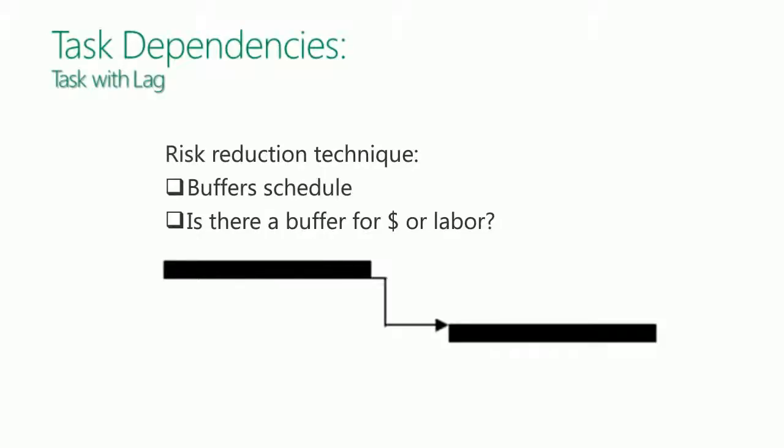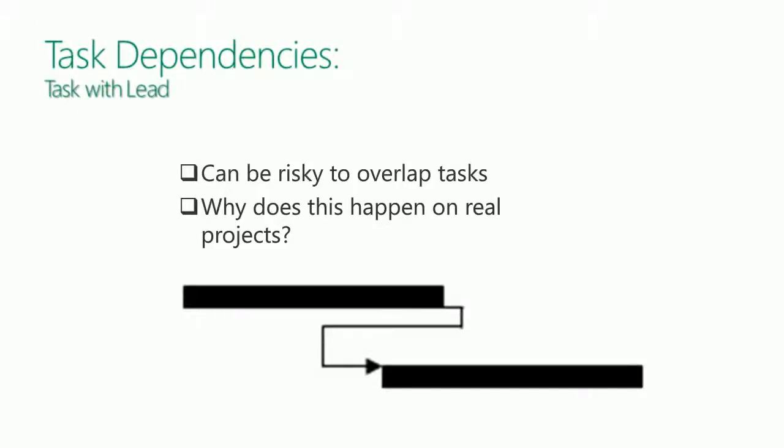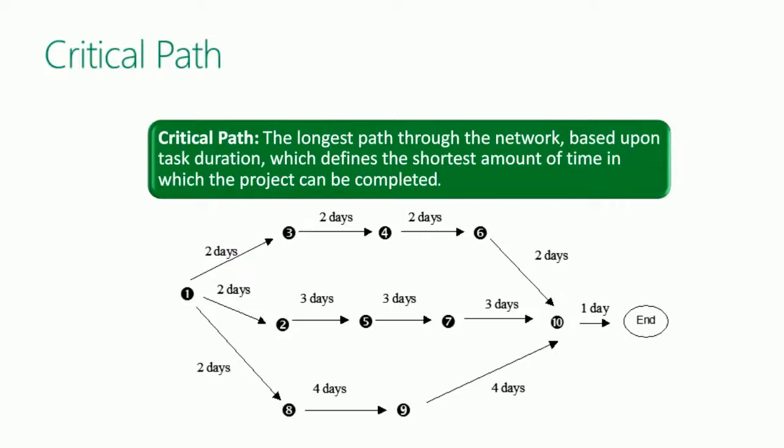The other thing, the opposite, introducing risk, is when we're asked to compress a schedule. Can we overlap? Can we start the development work before the designs have been signed off? We can, but there is risk. We increase risk typically when we have what we would call in Microsoft Project a negative lead, or negative lag, I'm sorry.